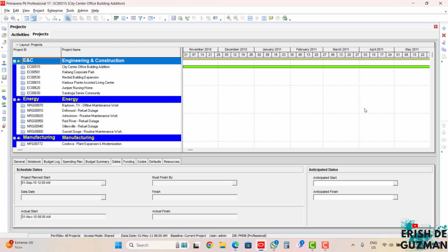So in terms of the coverage or the sizes of these calendars, global is the biggest one because it covers everything, all the projects, all the resources. It can be used with several projects at once. Project calendars are only available to the projects that they are created in. Resource calendars have the smallest scope. It can only be used with the specific resource or specific activity. And again, it has two types, the personal and the shared.